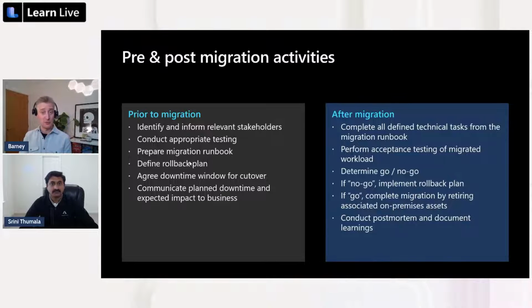and then being able to make a decision on, do you go ahead? Is this server, this workload, working in such a way that we want to commit and go ahead and stick with the servers that are now running in Azure? Do you need to have some kind of rollback process? Maybe you do the migration, you encounter some problems, your change window's closing, you need to go back and revert the work back to the servers on premises. Having a process in place to decide whether or not to do that, that's something important to have defined ahead of that activity.